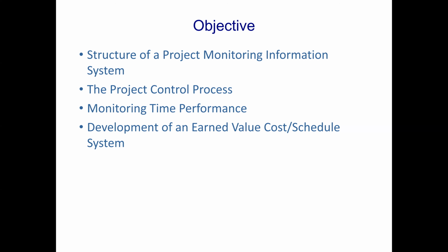And according to the PMBOK, that is the Project Management Body of Knowledge guide, the monitor and control project work process involves reporting and comparing actual project results against the project management plan. So these tasks will involve, again, collecting data, analyzing the data, and doing comparison studies, comparing the project objectives or management plan with the actual project results. We're also going to analyze performance data and determine whether corrective or preventive action should be recommended. Also, we are going to monitor the project for risk.